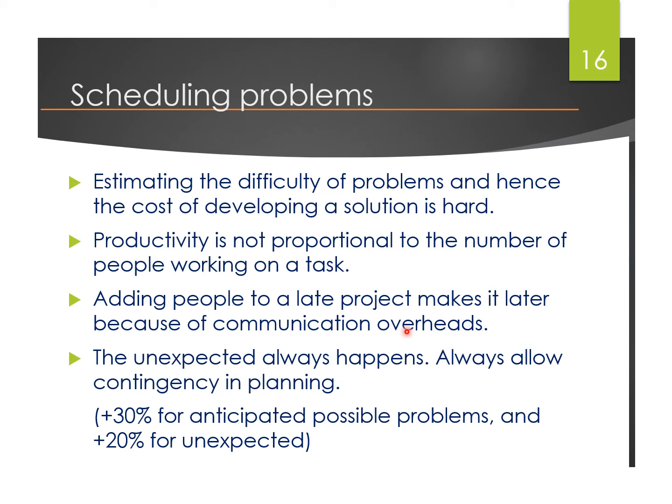Sometimes one way of solving this problem is by adding more people, right? But if you add new staff coming in, maybe in the middle of the project, you will have a communication problem. The new person might not know what happened before. So if the project manager or the project team does not update him, maybe he will make the same mistakes again. All right.